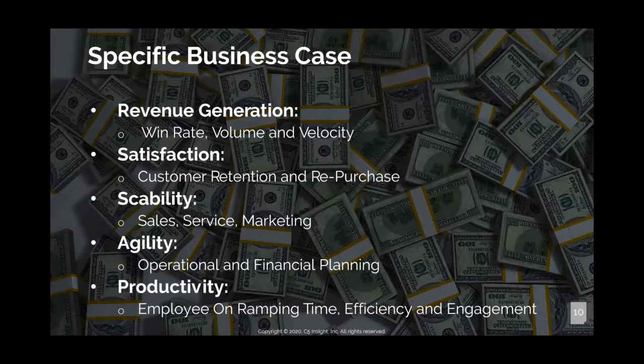For instance, we just finished a project for one client where they said, we've got an inside sales team, and it takes X amount of time for them to fully follow up with one lead. And we can get that follow-up time down by about 20% per person for each lead we're dealing with. I'm oversimplifying a little bit, but essentially what they could say is, now we're going to take our 10-person team and get done what 11 or 12 people would get done if we didn't automate this. Wow, what's that worth to us to not hire 2 people that we otherwise would have to go hire? That's a really clear business case I can put together.